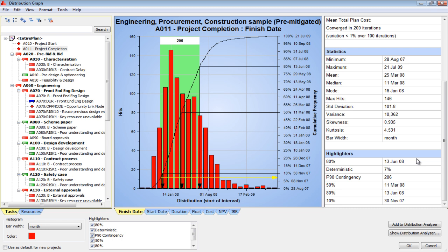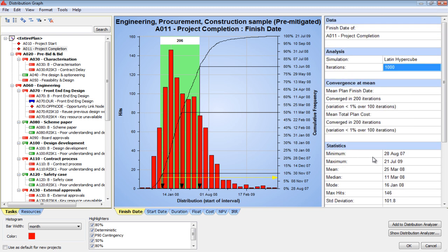This data means we need 206 days. If you want to be 80% confident, we need 206 days. If you're looking at standard deviation, you need to stop right now. I need to let you know we need to bring the schedule back in line 206 days. That's what you need to be focusing on. So when you look at the rest of these, some of these metrics, they're good. You want to base this on what your audience can understand and comprehend.